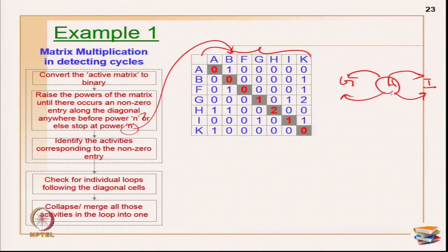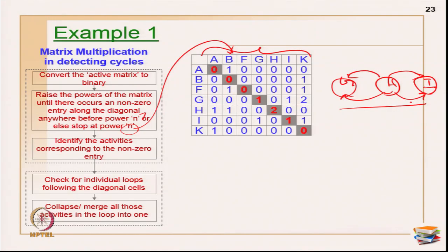So how does this relationship look? You can go through later after cross checking with the example. So this is what is the tracing on the whole loop. So this is primarily we call it as overlapping cycles. So H is primarily in the midway between G and I in the length of cycle of length 2. Okay. That is what we have identified in the matrix square or adjacency matrix raised to power 2.